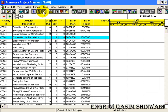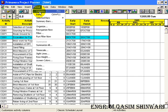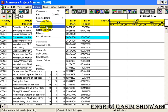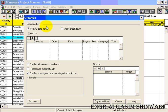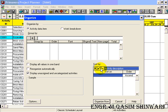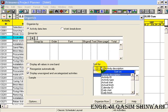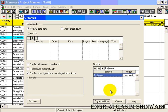OK, now let me do sorting. Sorting can be done similarly by going to Format, Organize. And here, Sort by, add and sort by early start.